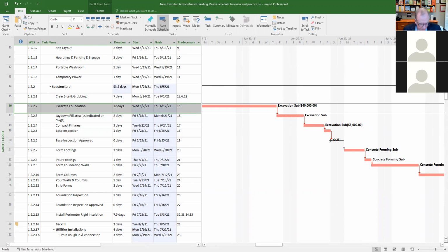We just wrote out the question, so we're just reading it. The narrative that we have to fill out, are we filling this out before or after the recovery? Well, the narrative, you're filling out the narrative before the recovery because you're explaining all the delays, right? You could have done the recovery already because it's a separate file, but the impacts of all the delays you're explaining, right? Okay.